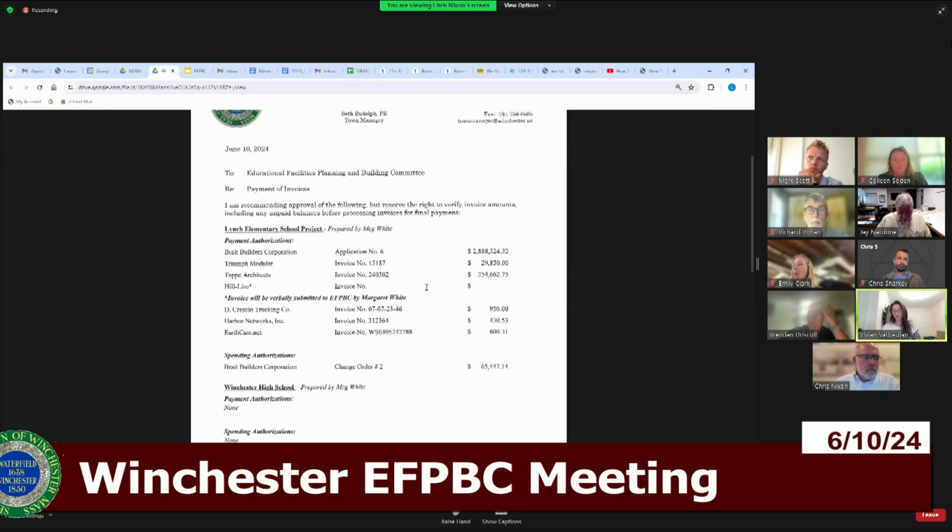It was just a little bit of what they had originally projected with the amount of actual staff on site, manpower on site. Otherwise there's no indication that the project is slowing down or any issues on site. They might have over projected at the beginning when I populated the cash flow and gave it to Meg for reference on what to anticipate. We're just tracking against that one. It's a small departure from it. It's not as big as it really seems.